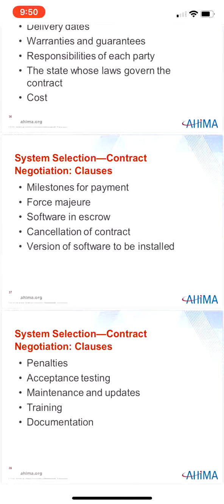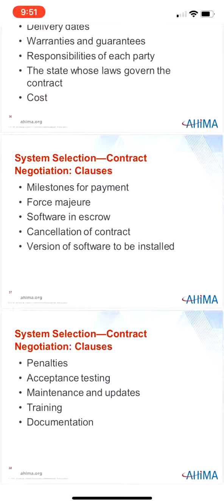Source code in escrow is another important contract clause. Healthcare facilities need to protect themselves in the event the vendor goes bankrupt — one way is to require the vendor to place the source code in escrow. Source code is the programming code used to develop the system. An escrow is a situation in which a third party holds a copy of the software in case the vendor goes bankrupt, allowing the healthcare facility to obtain the code so they can maintain the information system themselves or hire someone else. The vendor also prefers this method because it does not want its trade secrets to be widely available.